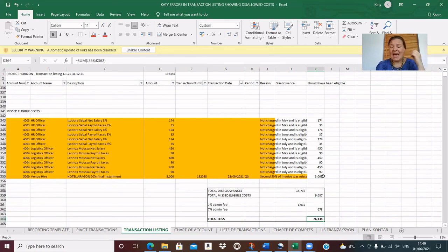And this, I hope, reinforces how important review is, because on a first impression, we thought we were doing well at 101% spent. But as we get into the detail, and this is the detail that the auditors will find as well, we realise that actually that result would have meant that we were 26,000 out of pocket, and that would have had to come from unrestricted funds.